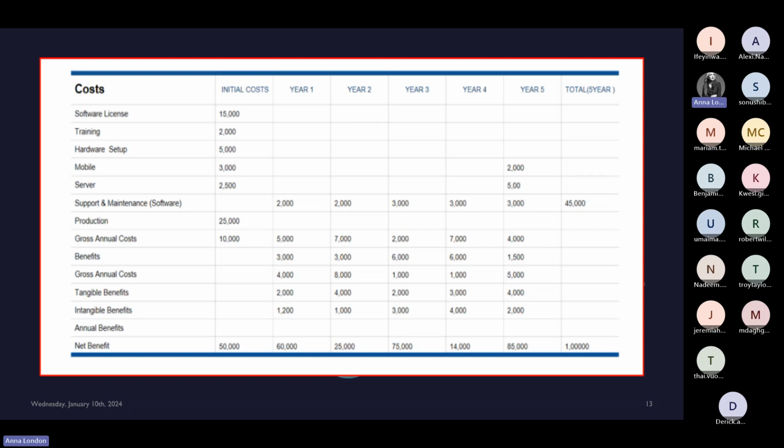Yeah, when you can't get them exact, but be careful because sometimes there's hidden costs you haven't factored in. So I always round up. And I always have in a report the exact numbers as close as I can get to include the quotes and correspondence and things like that to substantiate everything. But I will round up and I will tell them I'm rounding up just to give us a buffer zone in the event that something else was overlooked, because it happens, we're humans, right? So that's what I do.